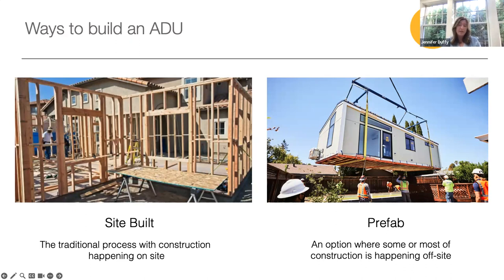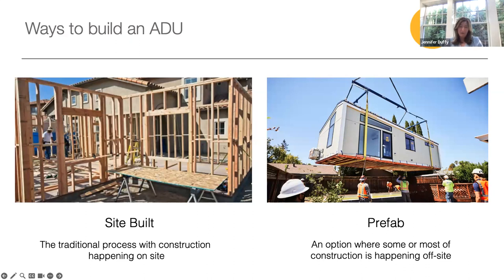However, if you don't have the necessary access to deliver the prefab unit to your site, or if your site conditions are less than favorable and require additional costs to support access issues or other site constraints, you will need to be aware that the cost can escalate rather quickly — almost to the point that prefab units can sometimes be equal, if not more expensive, than a custom-built strategy.